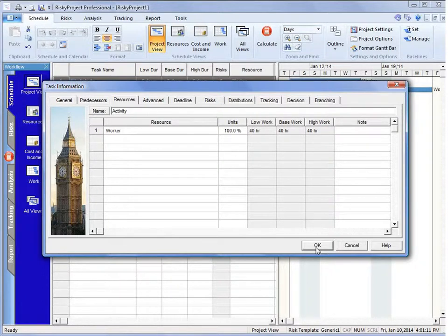And the project cost, due to the resource rates, the hourly rate, is now driving up the cost. That way, not only are we able to put a risk on that resource, and it could be because the resource is not productive or won't be available at certain times, it's also going to increase the overall cost of the project.